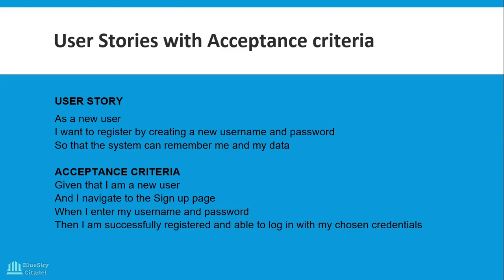So if I say, given that I'm a new user and I navigate to the sign up page and I enter my username and I enter my password, when I click on the submit button, then I am successfully registered and I am able to log in with my chosen credentials. Do you understand? So I've made it so many steps, but it's straightforward. You now know all the steps.